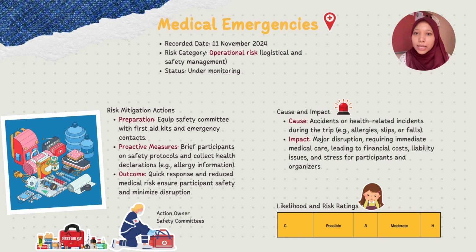So to mitigate this, our safety committee will carry first aid kits, gather emergency contact details from all participants, and provide a briefing on safety measures before the trip. Participants are also required to submit health declaration forms to flag any medical concerns in advance, such as allergies. This preparation ensures we are ready to respond quickly and effectively, safeguarding everyone's well-being.